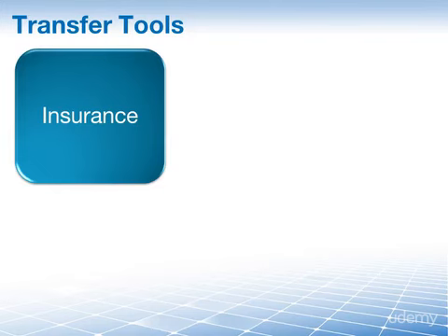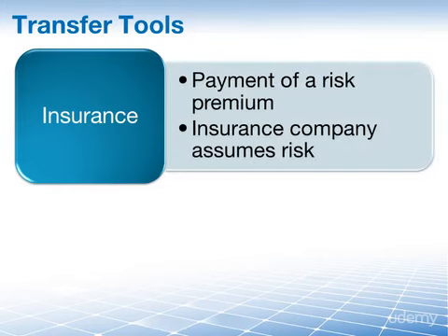Take insurance, for instance. You purchase insurance to cover the shipment of your data center hardware and the risk of it being damaged or lost in transit. The insurance company assumes responsibility for the risk and will be held liable in the event of damage or loss.